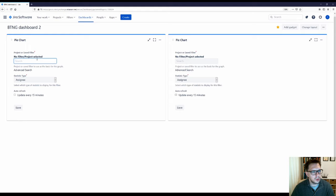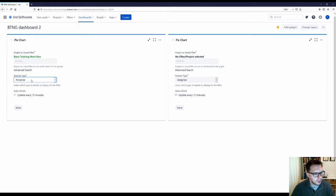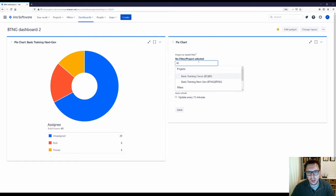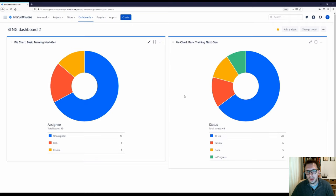I can set this up to search for a particular project. I'll search for the project by name — Basic Training — and choose the Next Generation project. Then I can choose the statistic I want. There are a lot to choose from, but I'll stick with Assignee, and set it to update every 15 minutes, then click Save. And then on the second pie chart I'll search for that project again and change the statistic to Status, update every 15 minutes, and click Save. Now I can see everything across all the different statuses as well as who's assigned to what.